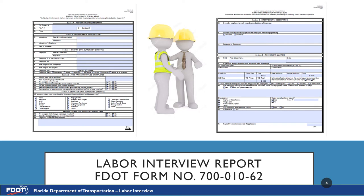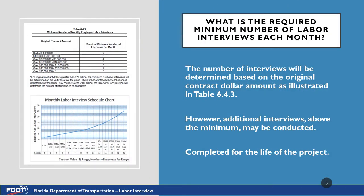The labor interview form is two pages long. It helps assess the employee's knowledge on their wages and helps determine if they are being subjected to any discriminatory practices. The number of interviews required on a project will be determined based on the original contract dollar amount illustrated in Table 6.4.3 of the Contract Compliance Manual. Additional interviews may be conducted above the minimum. This minimum requirement is completed for the life of the project and it is a monthly requirement — it is not a cumulative number.